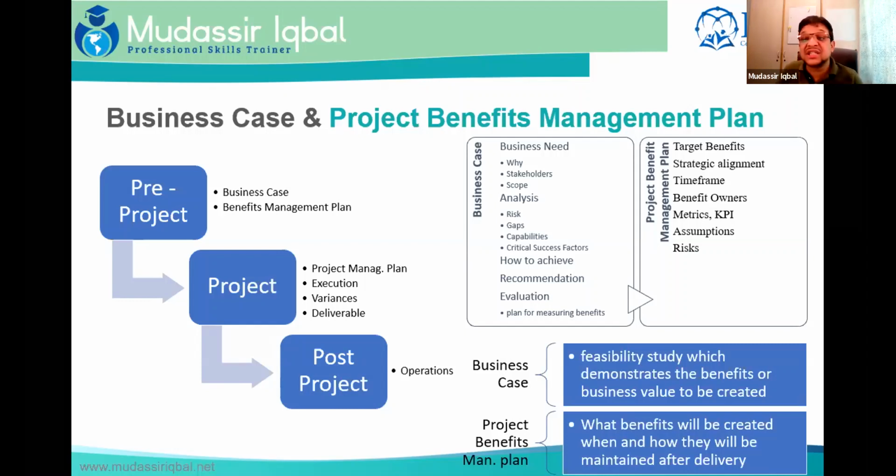The business case is a description of what your company is trying to get out of this project. How much money you are planning to make from this project? What is the benefit to your organization? What are the future businesses you might gain from this project? The business case tells everyone why the company should do the project. It's an input to building the project charter that tells everyone that the project has actually started, explains what is going to be delivered, who is authorizing the project, and who the main project stakeholders are who will be impacted. The project business case is a document which illustrates the cost benefit analysis.